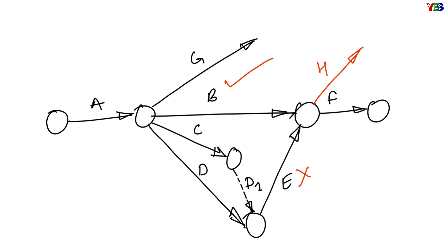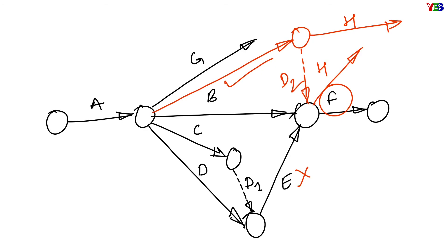to solve this problem, now we will need another dummy activity. We will make a modification by making a different head event of activity B, and we need a dummy activity to show dependency of activity F on this activity B.